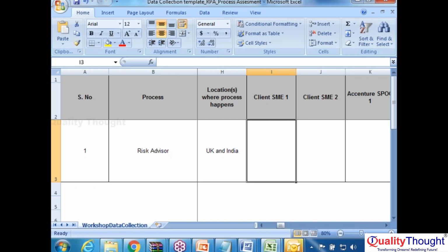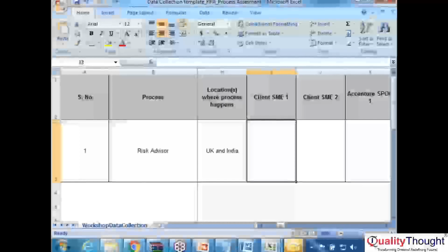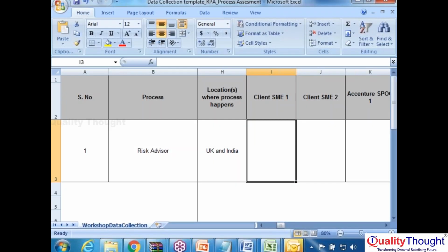But when we delivered to production after automation, some different person was telling different corrections. We don't want that. The person who has given the process information has to be validated, so it is better to write their names. Who has given KT about this process? For those only we will deliver. Because initially they were telling some process, and later a different person comes and says no, this is not the process.